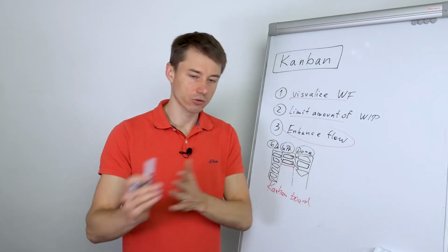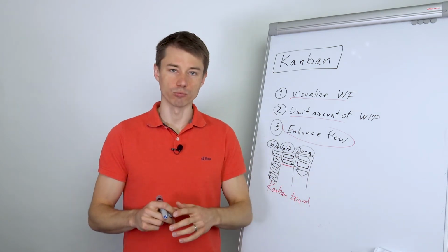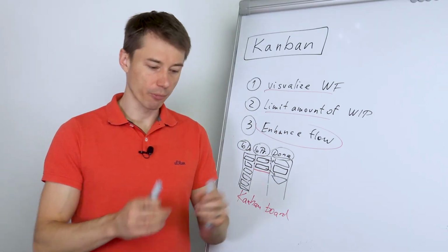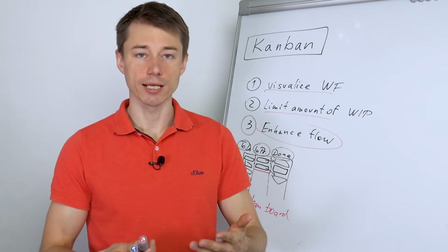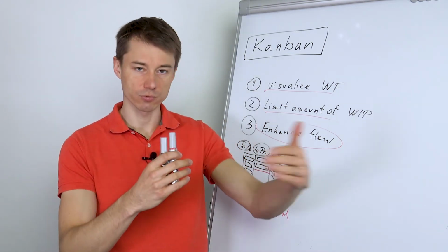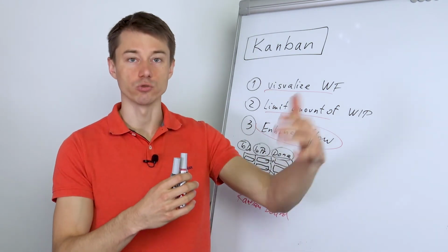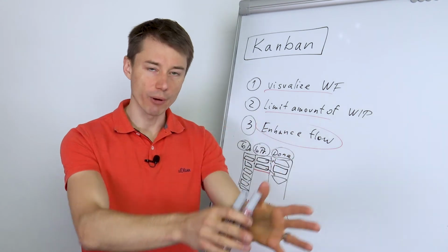So that's not what you do, right? You release every 2 weeks or every month a new mobile app. So for mobile apps, for example, in my previous company, we've used Scrum, because in Scrum you don't have continuous delivery. You have a sprint, at the end of the sprint you release. So that was great for mobile apps.